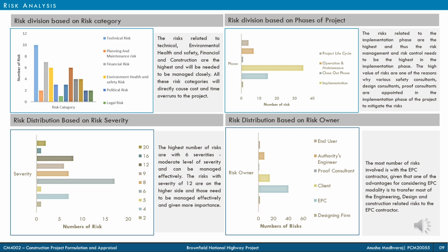It is observed that most of the risks are during implementation, which are majorly due to construction activities. The high value of risk is one of the reasons why various consultants are appointed in the implementation phase of the project to mitigate the risk.